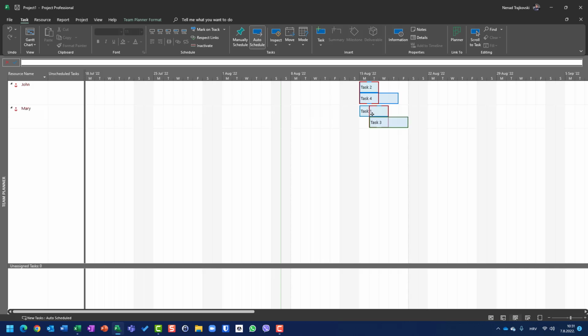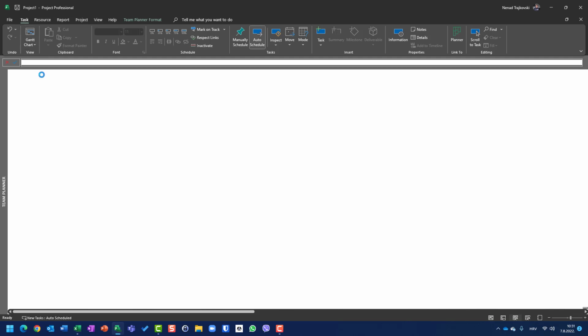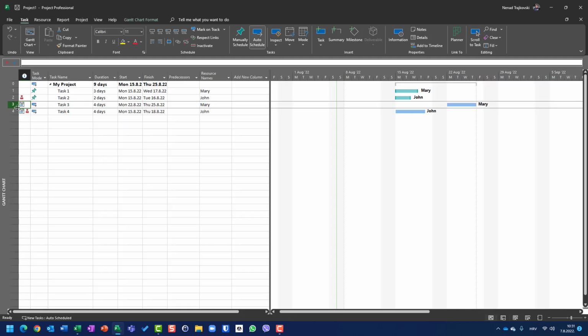Just drag it here. Let's say, okay, so in this time period, Mary is overallocated. Task 1 is supposed to start here, 1 day. On Monday, Mary is fine, but from Tuesday to Wednesday, she is supposed to work on task 1 and task 3. Okay, great thing. Now I can say, oh, I don't want it. I want it here. Let's go back here on Gantt chart. You can see those things. Okay, so start not earlier than.